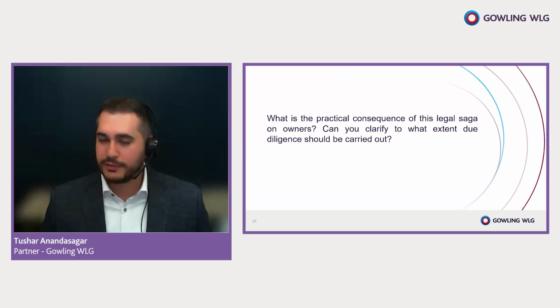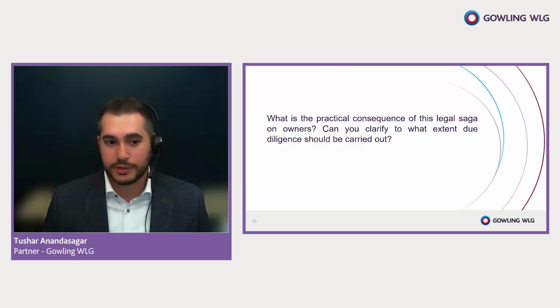Selecting that competent, safety conscious constructor is going to be key. Incorporating your OHSA obligations into procurement, to your point, Sahil, and contract language is going to be key. And then monitoring your compliance to make sure that the fence is up throughout your monthly inspections, reporting mechanisms, and oversight protocols. Yes, the quality control inspector is going on site to make sure you're getting what you paid for, but if safety issues are identified, they need to be dealt with, and like yesterday.